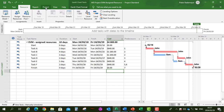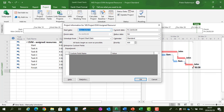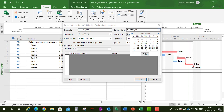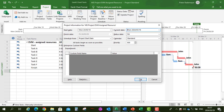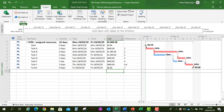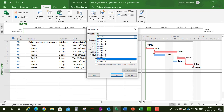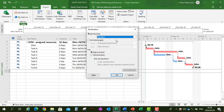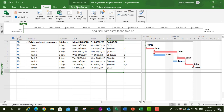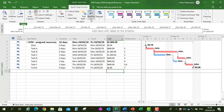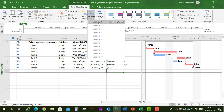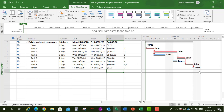Before we set the baseline, go to Project, Project Information. The start date is 18th of March. Under Project, click Set Baseline, and select which baseline you want — we'll use Baseline, which is what the calculations will be based on. Click OK. Then in Gantt Chart Format, go to Baseline and select Baseline to display it on the Gantt.